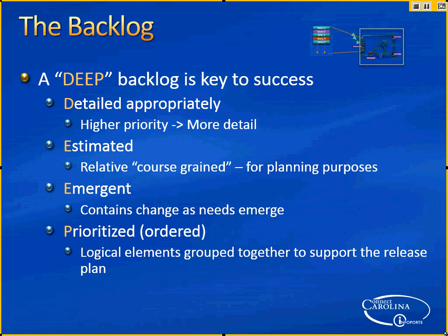Emergent, once again, changes as necessary. And prioritized, and I put in parentheses ordered, because there may be a story that's very high priority to the release of the product overall, but it's not really time for it yet. So when we say priority here, we really mean logically ordered for purposes of getting the release out.